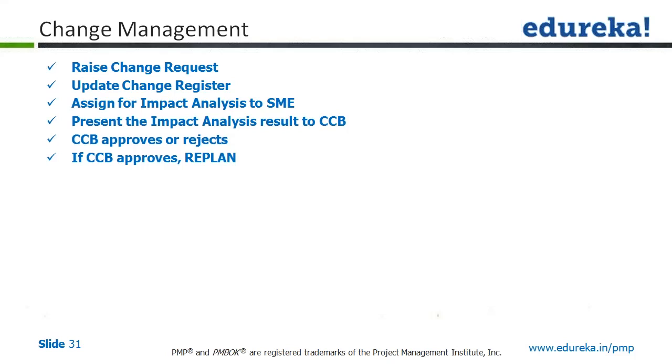So that means if the change control board has approved another 1 month extension to your project, then this 1 month would have an impact on each of the planning portions of your processes. And very clearly, you might have to replan those activities and bring them back into sync to ensure you are meeting those timelines.